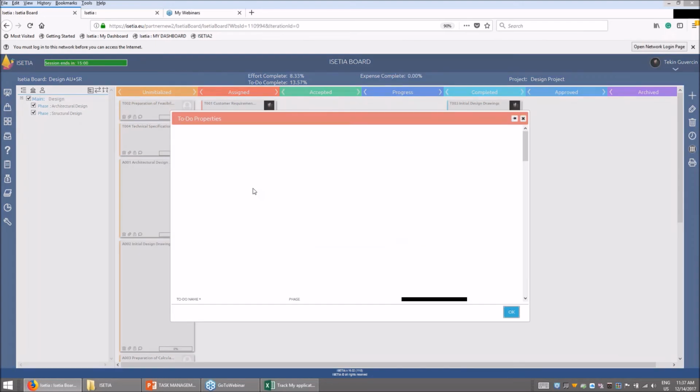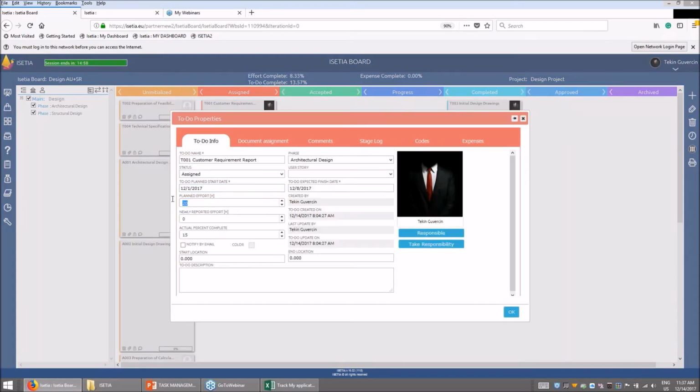What we do, we keep the planned and actual efforts, so that we compare planned effort and actual effort. We have 20 hours budget to be able to do this job, but we spend 25 hours. So our major idea, making it simple for people, is just entering what their budget is, 20, and what we achieve in 25 hours.